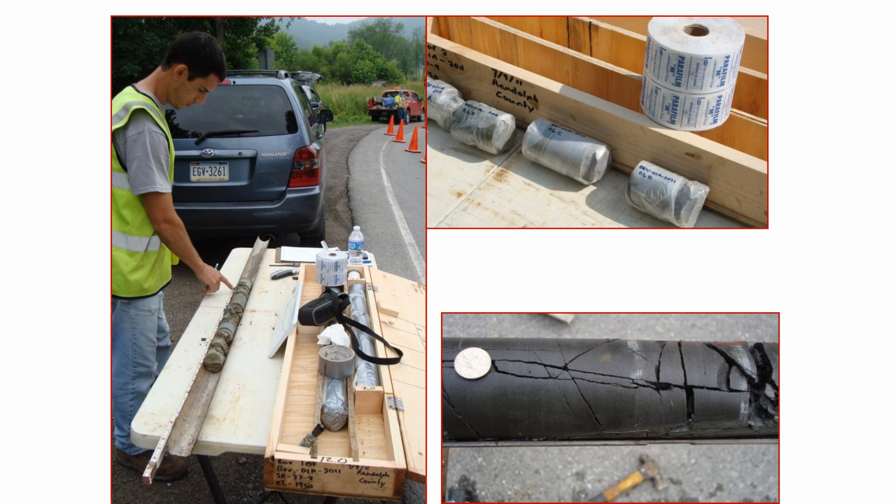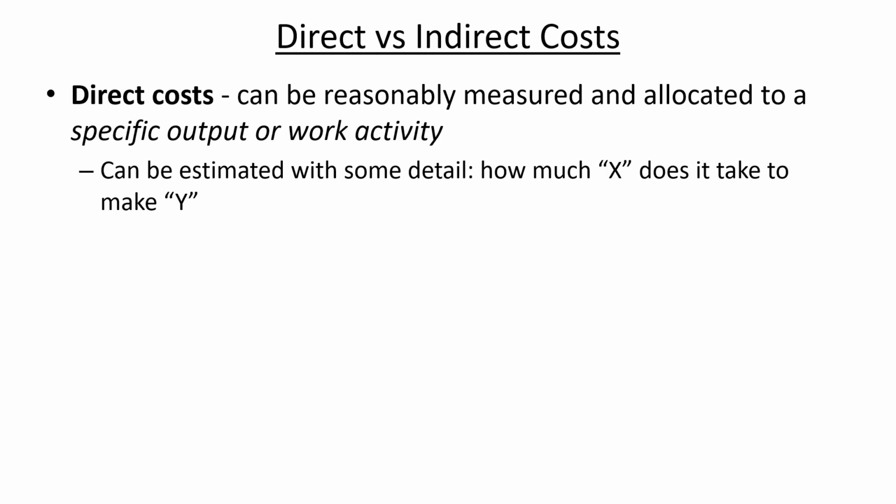If you see some resolution to the estimate, you can have a stronger sense of security that it's a reasonable estimate than if it's just a bottom line lump sum where you don't know if you're being overcharged or if there's any relationship between the expenses that they'll face and what you're going to pay.